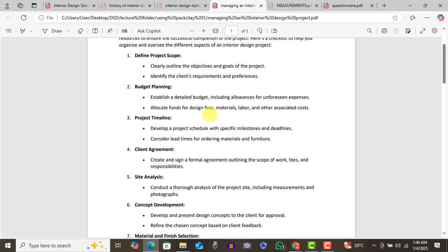Exactly. I always tell myself, okay, so I'm in construction. If an artisan gets a daily wage of, let's say, 200 Ghana cedis, and you as a designer are going to sit down for about 2-3 days to do an estimate for all those things, that's a fair idea of how much you should get. Let's say one day no more than 200 cedis, that would give a fair idea. Your time must be worth something, right? So you need to trust me, what Joseph is saying is true.